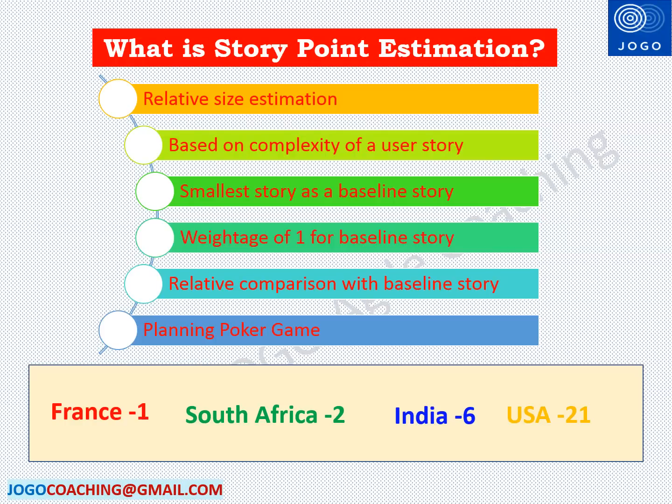Now let's discuss what is story point estimation. Story point estimation is a relative size estimation. This estimation is done based on the complexity of the user story. One smallest or a small user story will be taken as a reference or baseline story from the backlog. Weightage of 1 will be assigned to the baseline user story. So the story point assigned to the baseline user story is 1.